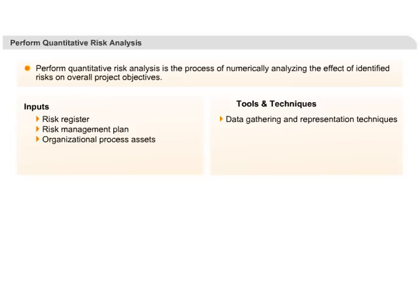For example, using Monte Carlo analysis, you can check if the project is executed 100 times, what is the probability of completing the project on a specific date. Similar analysis can be done for risk as well. Numerical data also helps in using the decision tree concept to objectively analyse project risk and impact.